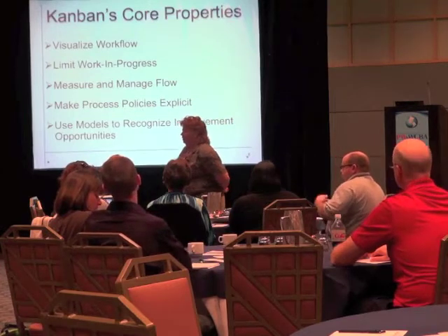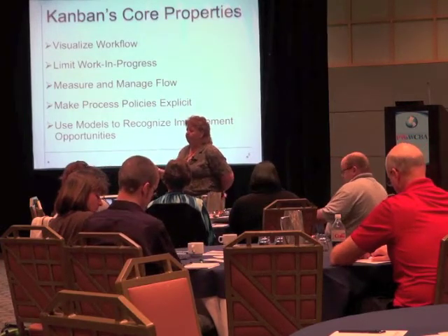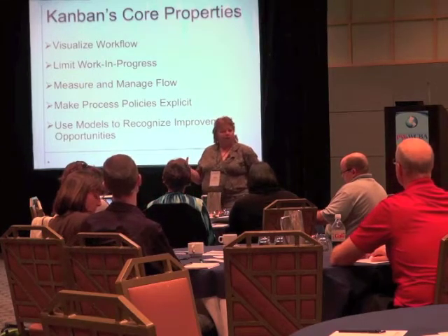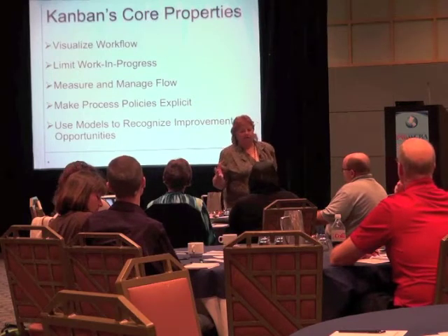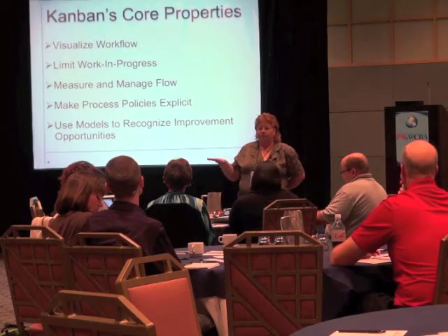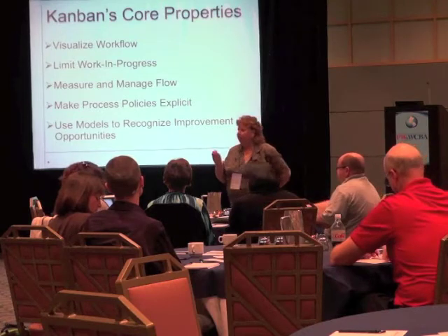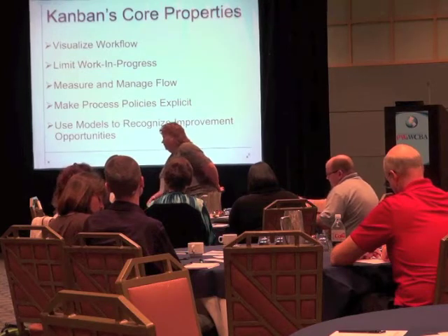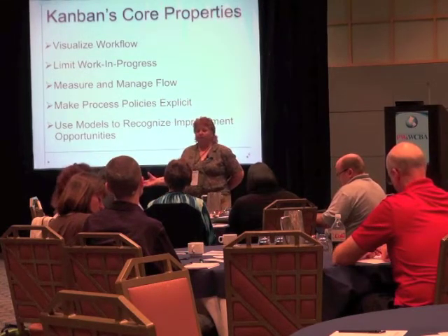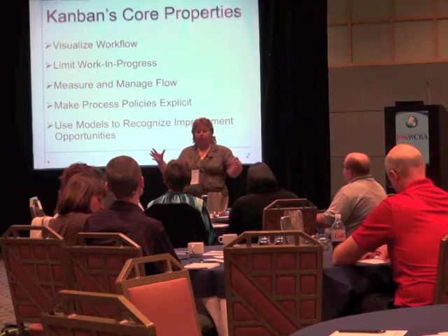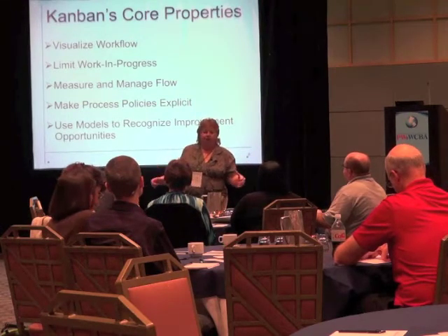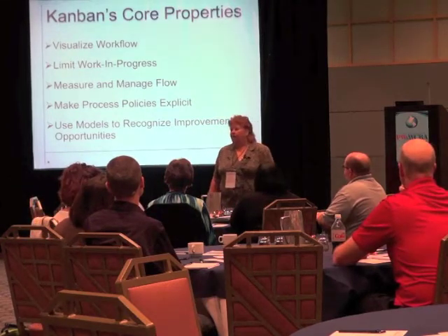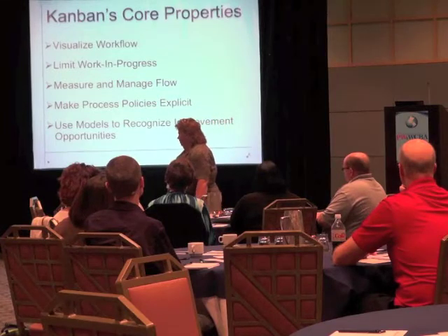A lot of people fret over deciding what the right queue size is. I'm one that believes in Kaizen, which is small change in Japanese, so don't worry about it. When you start out, set a limit. If it doesn't work, change it. The minute you find that is the blocker, change it. That's also why this really fits in with the Agile paradigm. We're not expecting you to go out and do some huge analysis effort on all your workflow and come up with an optimal workflow for the whole organization, publish it for everyone and say, go do the work. Chances are that won't work too well, at least not for longer than a couple of days.